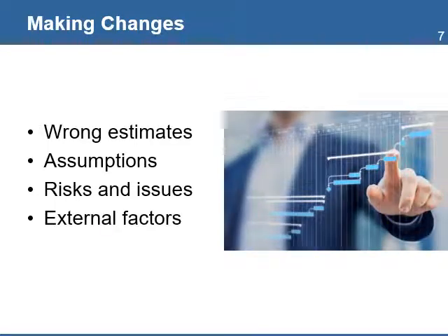During the analysis of the change, you need to investigate the causes for the delays and implement corrective actions so they don't happen again. Changes are mostly caused by wrong estimates, assumptions that are not valid, risks that were not identified, issues that steal time from the project, and factors outside the control of the project.